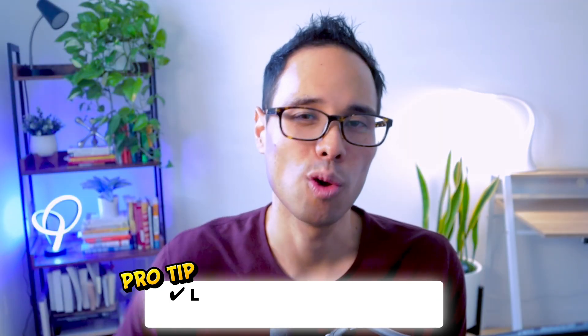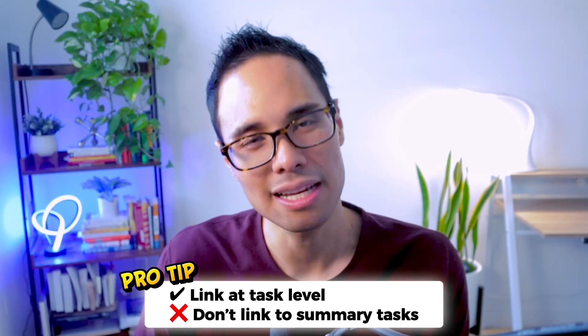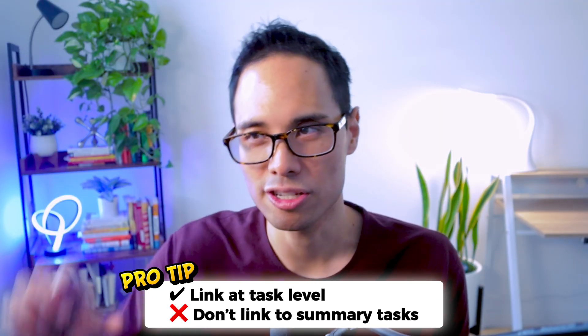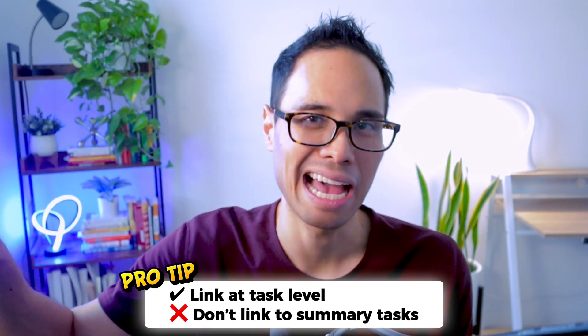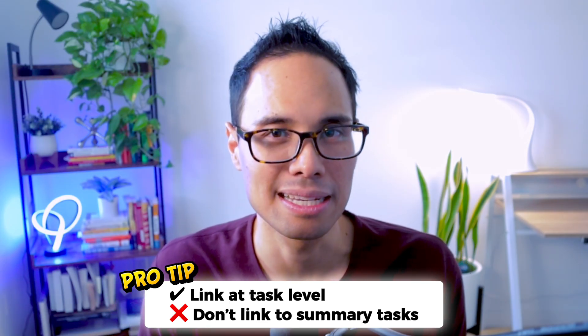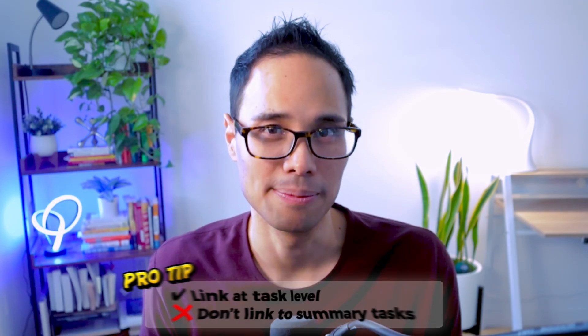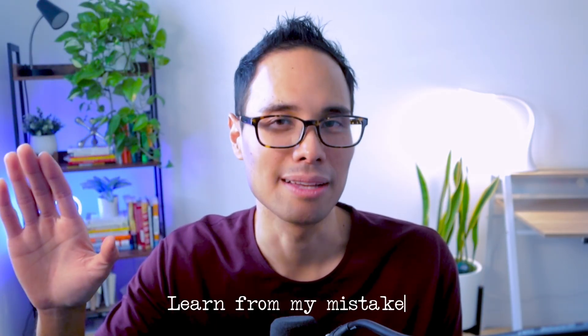And another pro tip, don't link predecessors or successors to your summary level tasks. Instead, stick to linking your dependencies at the task level. I'm warning you in advance because if you don't set up your dependencies correctly, Microsoft Project may incorrectly calculate your critical path. Trust me, learn from my mistakes. I've wasted hours of my time because my dependencies weren't linked correctly. This would have saved me so much headache, frustration, and hours of my time because I was managing a project with more than 100 line items.